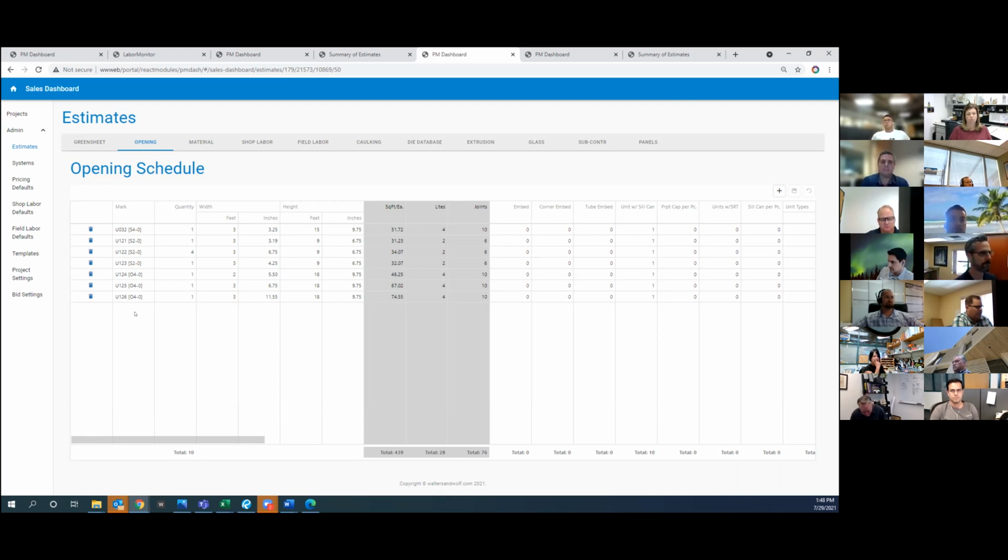Tomorrow, we want to make it so that the unit ID is created when we do the sales model. So now in the future, when we're talking about, oh man, we had 100 standard units and now we only have 50 and there's much more custom, what changed? We can actually trace it back to the individual IDs. We can look at how a specific unit on the job changed from upfront during pre-construction to ultimately down the road when you're releasing it to fab to actually build it. Now that unit can get tracked through its entire life cycle.